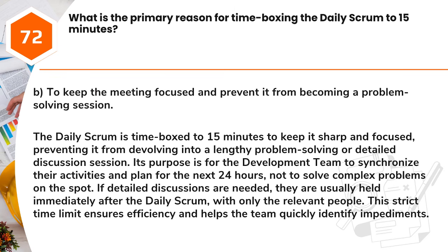If detailed discussions are needed, they are usually held immediately after the daily Scrum, with only the relevant people. This strict time limit ensures efficiency and helps the team quickly identify impediments.